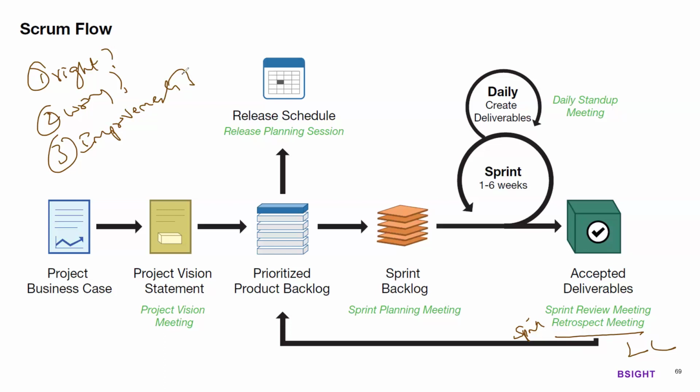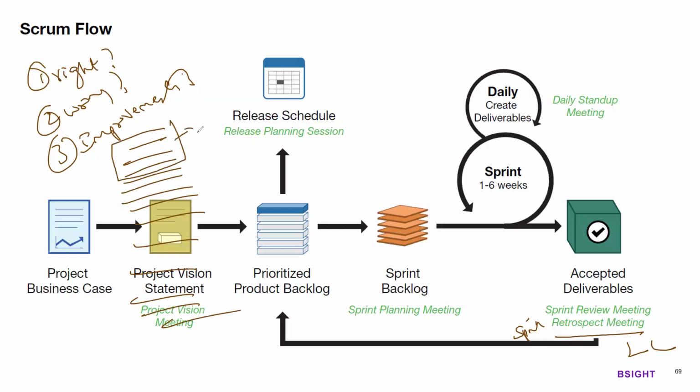In early sprints, a number of improvements will be identified. We can do that, we can do this, etc. And you won't be able to implement all these changes in the immediate next sprint. So again, you will prioritize and say these 3 top priority improvements we will implement in sprint 2, and then other sprints will implement the other improvements. And with that, you will finish with the sprint.